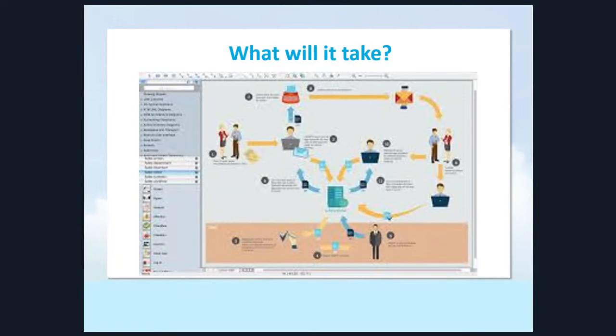So then you've got to build out what we'll take. And too often we prescribe that as go do some stuff. Now this slide is fuzzy and it's that way on purpose, so I apologize, but I wanted to illustrate the point that starting with the end in mind, you want to work backwards through all the steps and paths and input points to the plan from current state to final state so that you can determine midterm measurables, individual costs, and potentially even branch points.